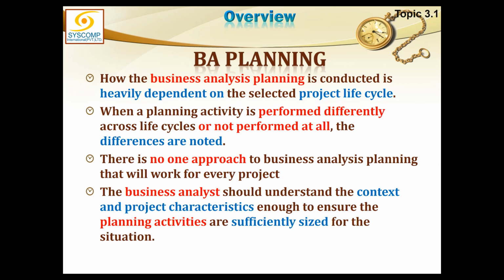So let us say all the work which is underground is to be completed in phase 2, which includes digging, demarcation, foundation, whatever. So all this is phase 2. Once phase 2 is completed, what will we get? We will get the underground structure ready. Now I can move on to the next phase.